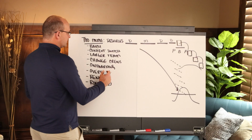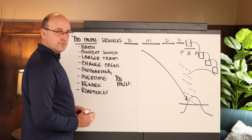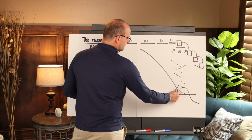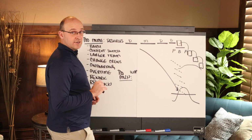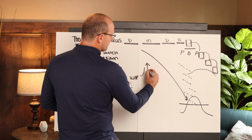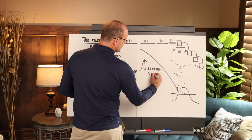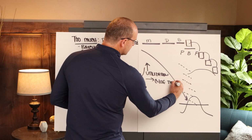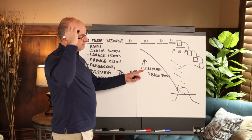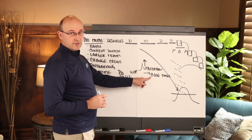The second thing that I want to talk about is when you have too much, and what I mean by this is too much work in process. So I'm just going to call this WIP. When you have this right here, we've covered this in another video which we can link you to, but when you have a higher amount of utilization, okay, that means that your cycle times increase. If you have too much utilization, let's just use the freeway example, there's too many cars on the freeway, the time it takes you to get to work is longer, okay?